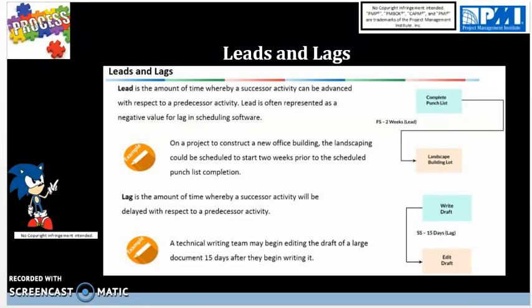Lag is the amount of time whereby a successor activity will be delayed with respect to a predecessor activity. For example, a technical writing team may begin editing the draft of a large document 15 days after they begin writing it. That's an example of a lag.